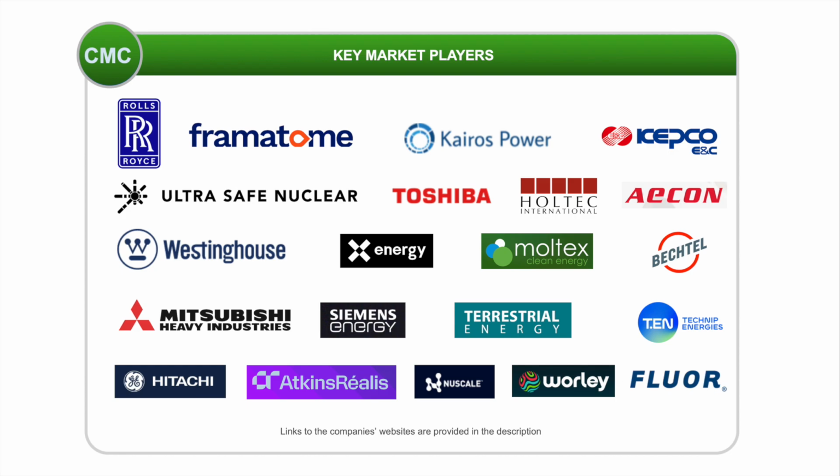After a desktop market review, you have to send expression of interest letters to the pre-selected candidates. Interested parties will receive the project information package after signing a non-disclosure agreement. In our experience, it is best to organize a face-to-face consultation meeting which is not too short, 4 to 6 hours, in which you openly discuss your contracting strategy and listen to the provided feedback.